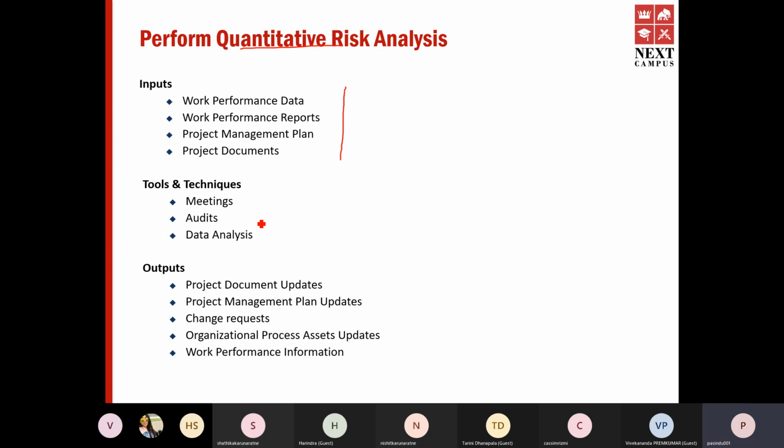Contingency reserve I had to deal with known unknowns, but this was an unknown. So I had to go to the C-level, agree, discuss, and come to an alignment. So we used the management reserve for this extra cost, right?